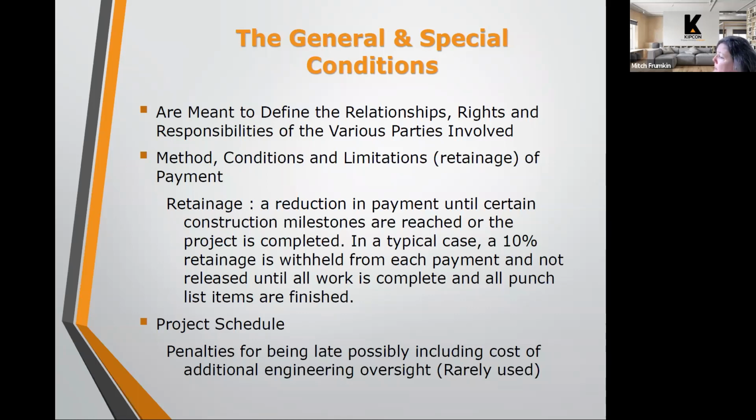Also, the method of payment. Is it going to be invoiced as the work is completed? Are there milestone payments, such as a third, a third, and a third? So the conditions within the project documents will define these types of things.